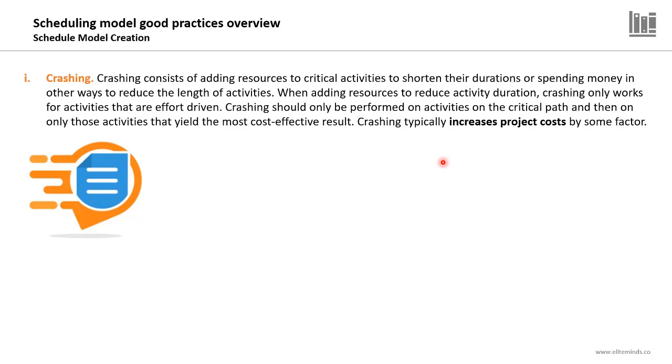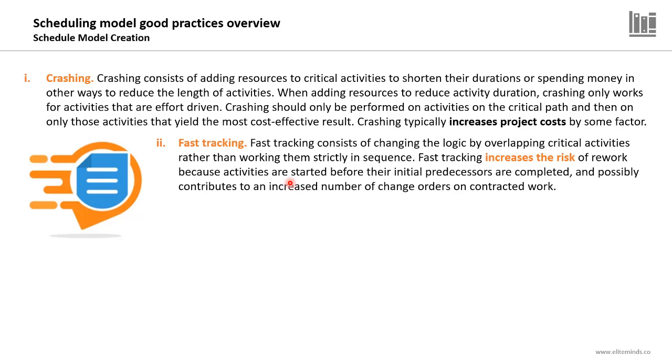So the question I got in my PMI-SP exam was around which schedule compression technique will not sacrifice the project quality or the project scope. It was crashing. Crashing will only increase the project cost. It will only sacrifice the project budget.